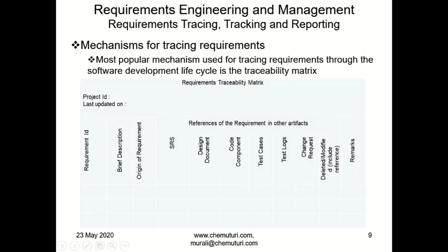And the code component has to be there in all methodologies, including Agile. And test cases, you may or may not have test cases in Agile. If you don't have test cases, then at least test logs. In the test logs, you must include it. And if any change request has been raised and delivered, how did we deliver it? Include a reference in the delivered product. And any specific remarks, some points you want to note, can be there in this column.